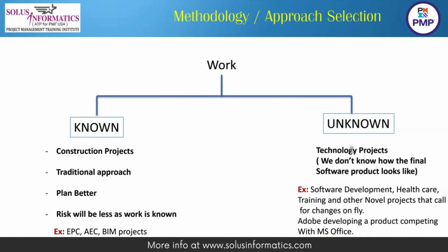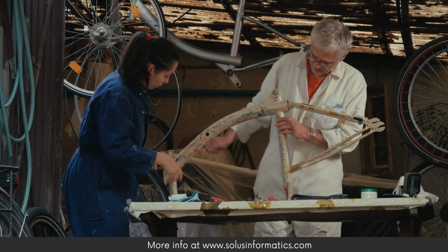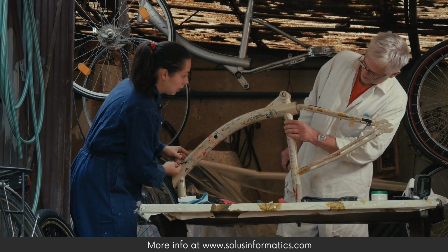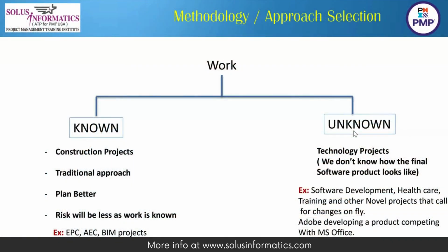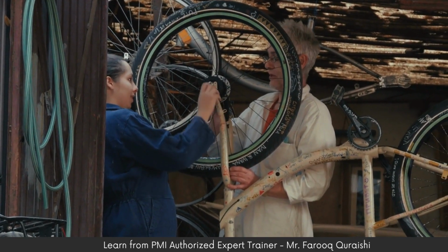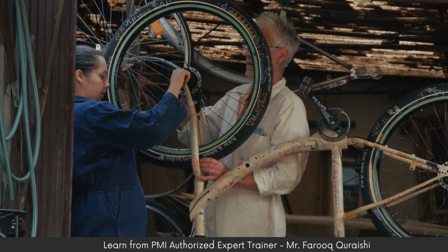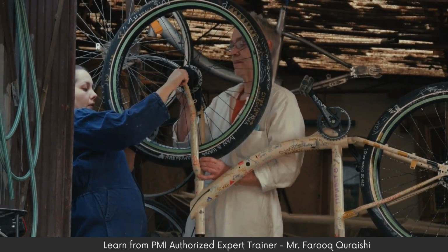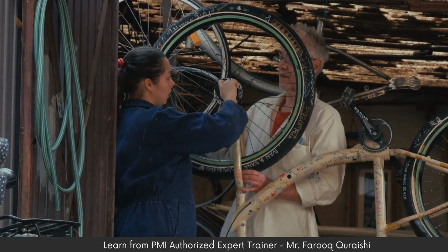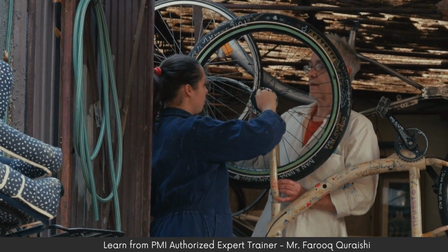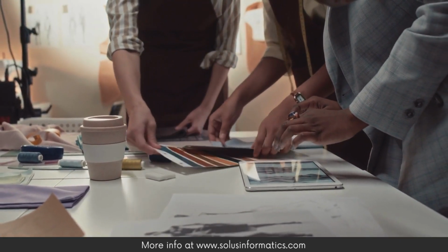When we say an example of agile methodology, a wild example is making a sports bicycle. So the customer comes just with a concept in his mind. If you use the agile methodology to make the sports bike, you first make a basic sketch of it, a prototype, and then you will be experimenting with each part of that bicycle. Customer will be involved at each stage. First, experimenting with the weight of the frame, experimenting with wheels, tires, tubeless. When the customer is happy with one part, then you go to the next one.